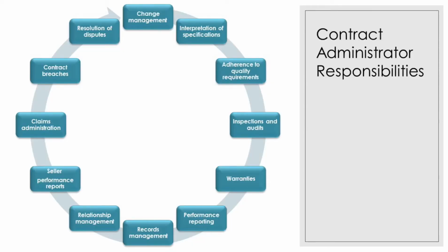The contract administrator may collect data and manage project records, including records of physical and financial performance, and establish measurable procurement performance indicators. They might also refine the procurement plans and schedules. They might gather, analyze, and report procurement-related project data. They also monitor the procurement environment and implement and facilitate any adjustment. And of course, a huge part of their responsibilities is related to the payment of the invoices and payment requests.